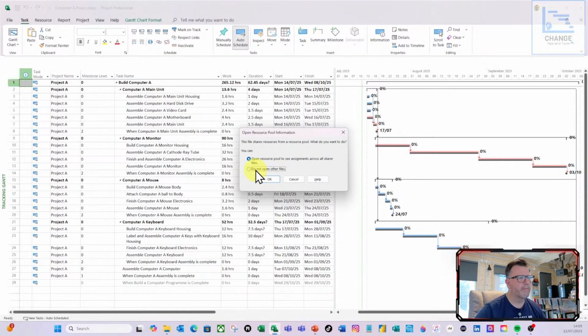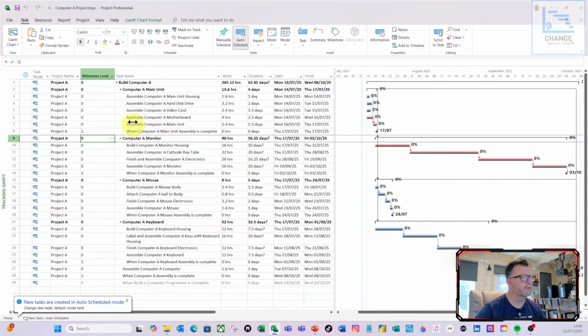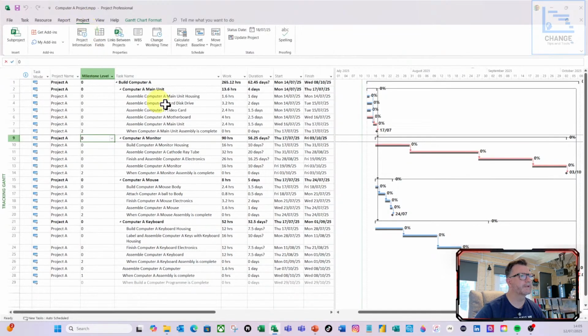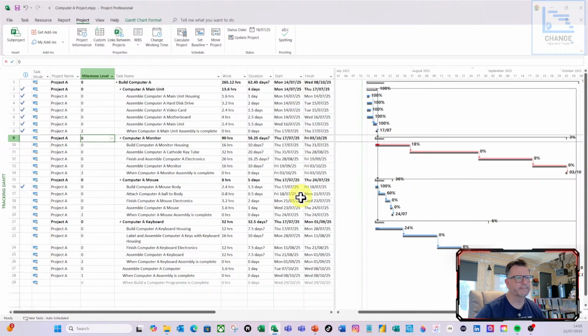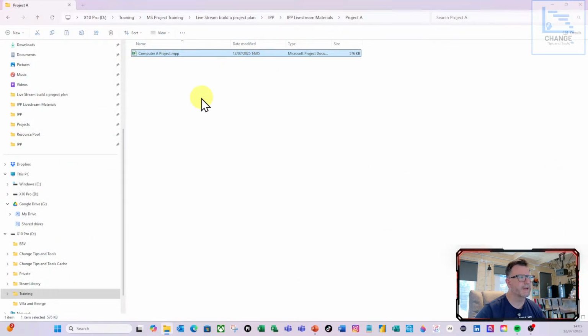I'm just going to leave it like so, and I am just going to go in here and do project, update the project, and I'm going to say update it as scheduled. Yeah, I'm going to do OK. So it's now updated my activity. I'm going to do save. I'm going to close that down.